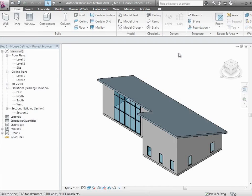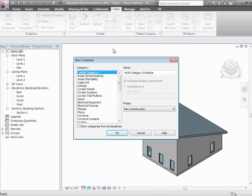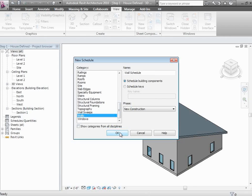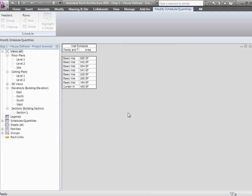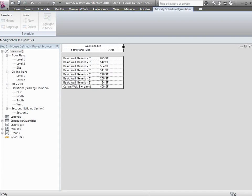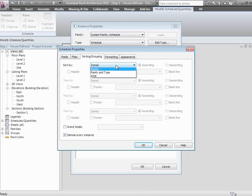To illustrate this, let me pop over to a different model — the simple little house model we were looking at from an energy standpoint. Let's think about how to compute the quantity of walls. If I create a schedule of walls and include the area and family and type, I can see all the basic wall surfaces as well as curtain walls. I'll add subtotaling by family and type with a footer and blank line, plus a grand total at the bottom summing the areas. That gives me about 3,000 square feet of one wall type and 400 square feet of another.